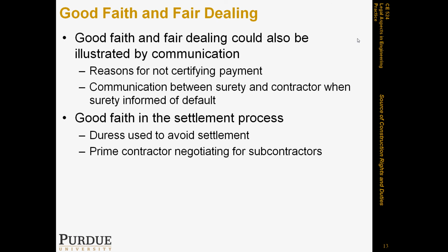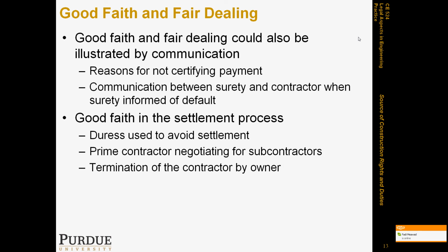For example, if they're negotiating terms for themselves and for the subcontractors, they're expected to observe the best interest of their subcontractors as well. Termination of a contractor by an owner also has to be done while observing the covenant of good faith in the settlement process. So if a settlement ensues after a termination, that also has to happen in good faith.